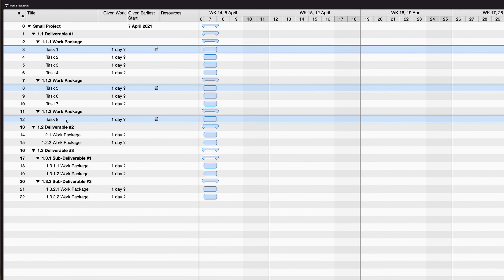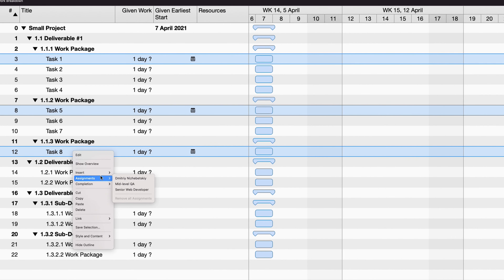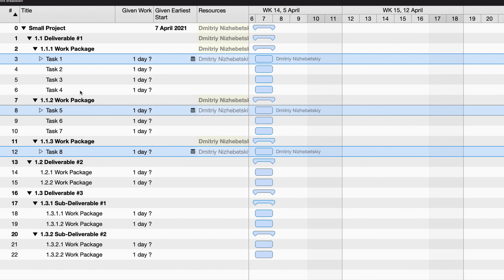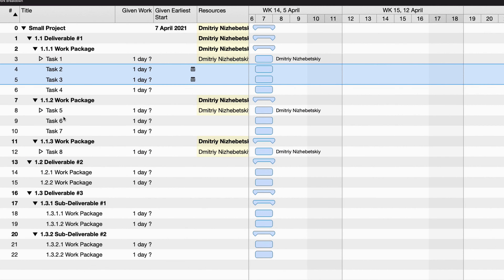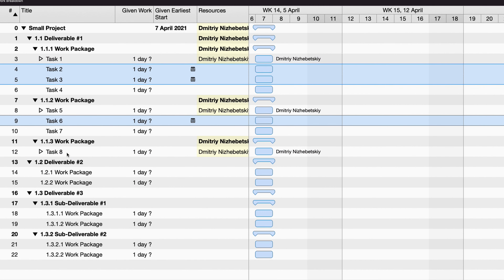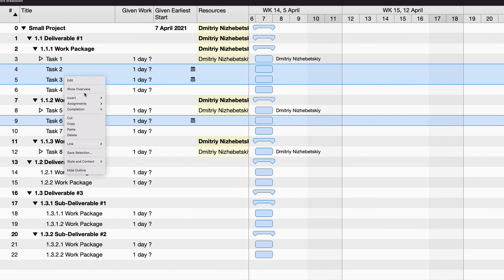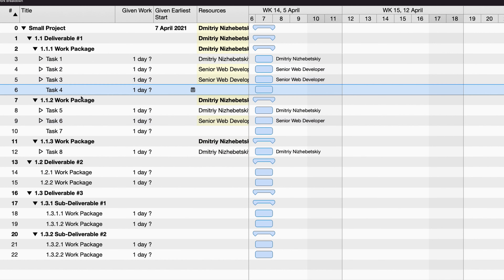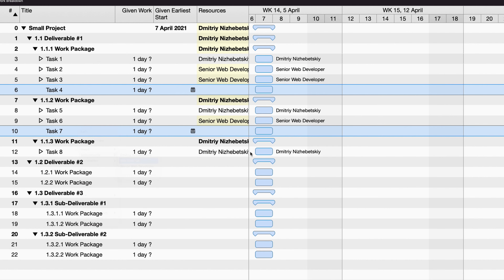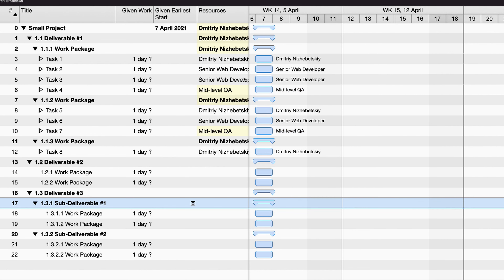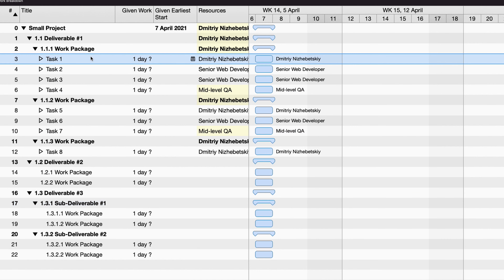The next step is to assign resources to each task. If you already have a team, you assign real people to each task based on their expertise. If you don't have a team yet, you identify a role on your project capable of completing the task — for example, a senior software developer or a senior QA engineer.